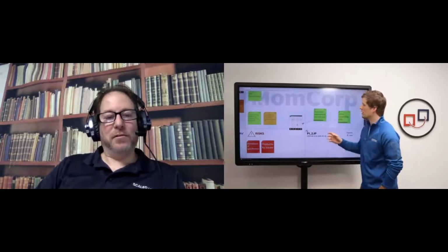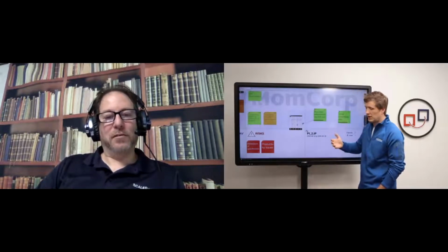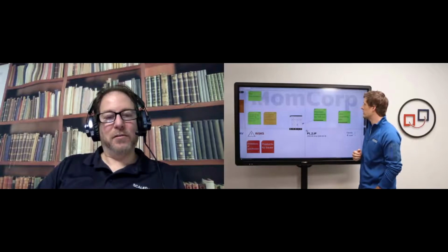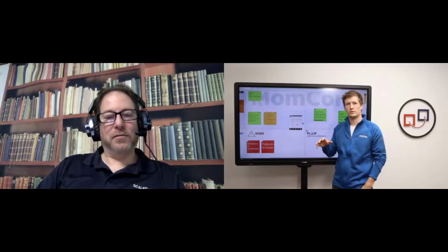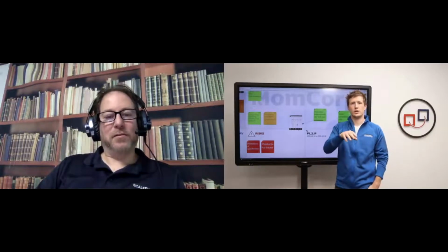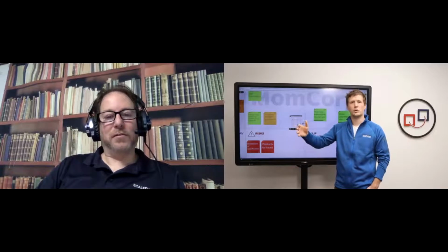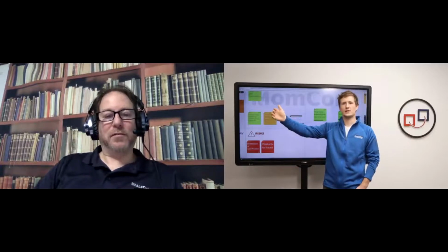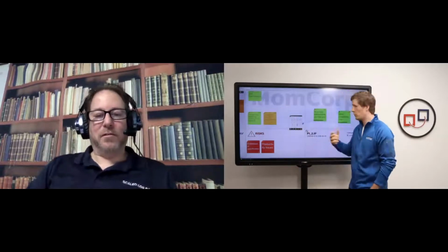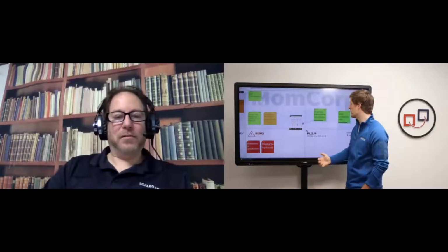One thing I experienced is a good way to do this, not only remotely but also when you're co-located, is using stickers to get additional visuals on your board, and everyone sees that someone is expecting something from me as RTE or product manager.